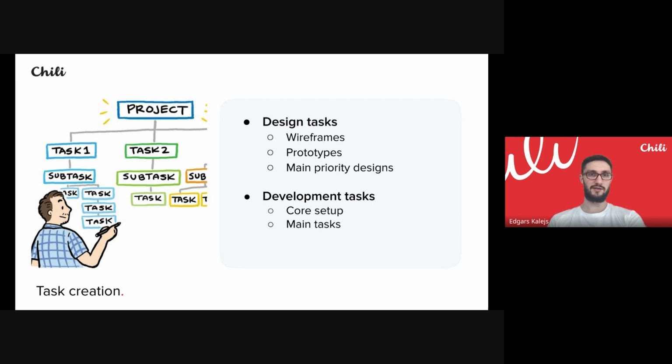We do sprint plannings, and sprint is an interval of time, 1 to 2 weeks, that we know which tasks have to be done in this period of time. And after this period would be 1 week, 2 weeks, in a few edge case scenarios even longer. We make retrospectives and see how did we do in this case.